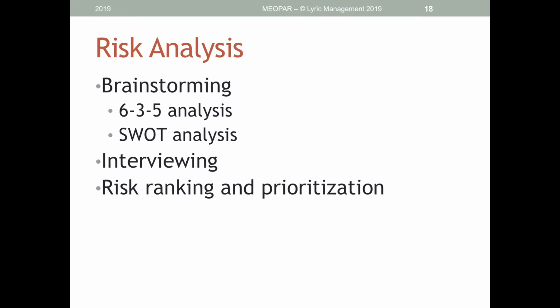So there are a couple of formalized brainstorming approaches that we can take to analyze risks that I'm going to touch on here. If we're not able to bring the project team together to do the analysis as a group, or maybe the work that we're doing is so new that we don't have the resources within our team to even understand the kinds of risks that we might be encountering, we would want to interview other people with expertise in the field, or maybe people who have done similar types of projects in the past, to get their perspective on where we might anticipate some risks within our project.